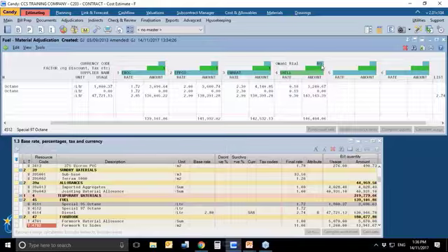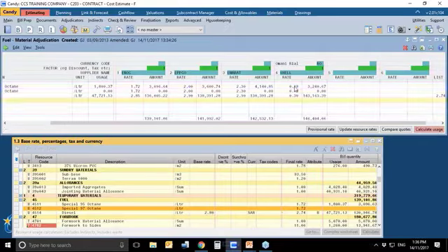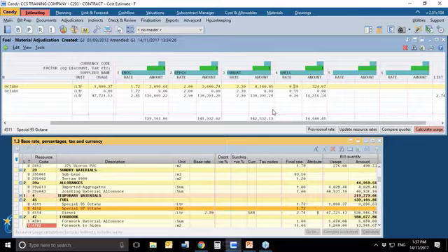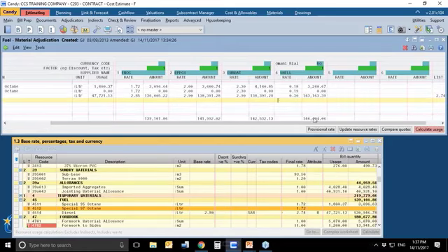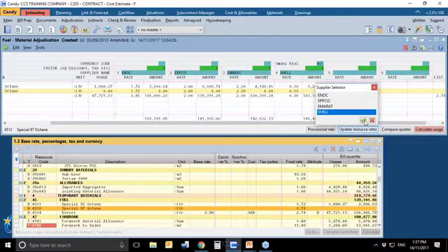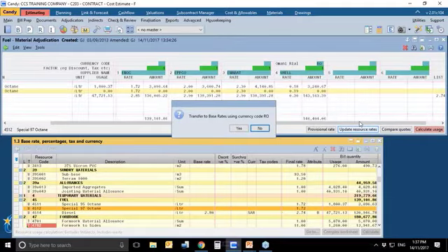However, for the rates for Shell, you would notice I've allocated a currency code RO, which tells me that these rates are not in dirhams, they are in Omani Riyals, and one Omani Riyal is 10 UAE dirhams. So if I did not have this currency code allocated against this, you would notice that your totals are incorrect. How do I allocate a currency code? I can type in the currency code in the field, and there you go, your amounts are worked back to AED. Now, if I want to use Shell's rates for my resources, I would just keep my cursor in the rate column for that particular supplier, update resource rates. I would like to use Shell's rates, green tick.